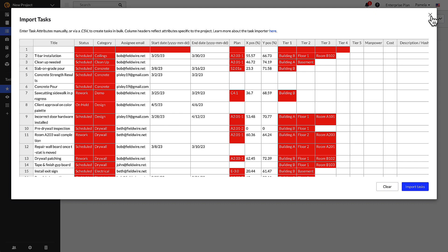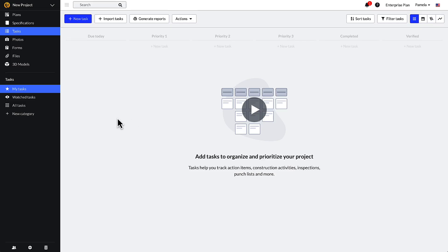Please note, the importer is case-sensitive so be sure imported attributes match the spelling and case on Fieldwire. We recommend configuring your tasks before bulk importing them to eliminate these errors.